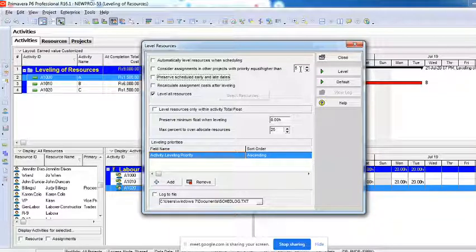How do you distribute that? So what we do, if there is a conflict like this, then the tiebreaker is usually the priority. If there is any equal or higher priority, then that particular project's activity is considered first, and the activity which has lesser than this number, that particular activity's project will be delayed. Understood? Just like what we were doing.